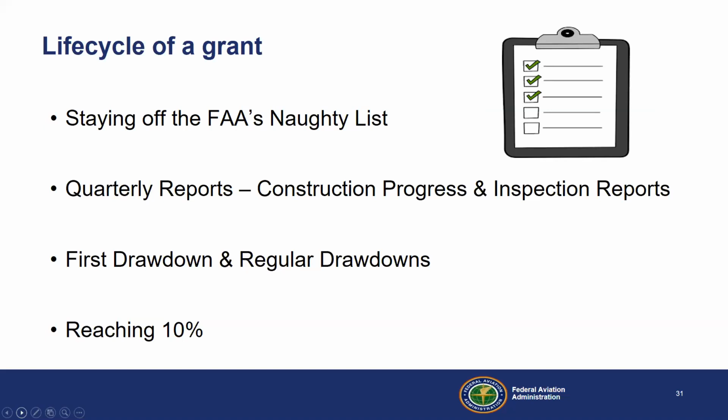That is really important. Quarterly reports, make sure you are sending them to your program manager so that we can keep those in the file. Those are for audit purposes and for maintaining your obligations under 2 CFR 200. That's not an FAA requirement. That is a federal government, you getting money requirement.